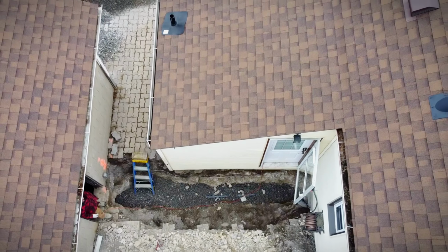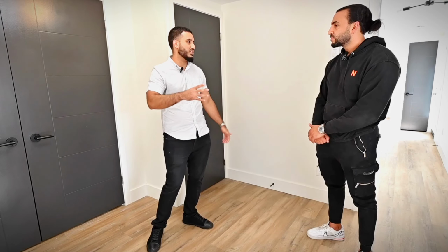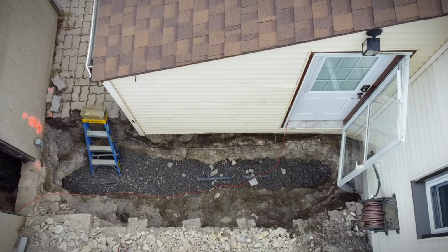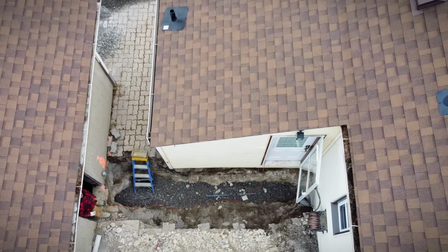Usually there's clay, and then on the mountain, the more north you go, you start hitting rock. And that probably ends up like, how much more would you say that cost you, percentage-wise? Like, this was a very small trench. It cost an additional $4,000 to $5,000 to trench bedrock. Wow. Okay. It could have been a little bit less if the lot was bigger. Yeah. But not much. It still would have been $2,000 to $3,000 more.